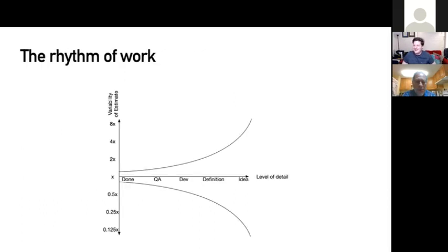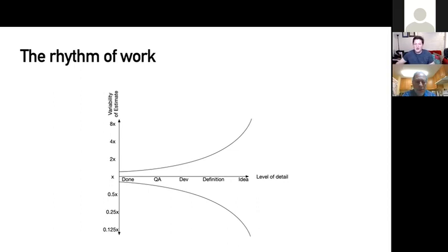When working in a team, you need a rhythm. One common way is the daily standup — at the start of every day, people say what they achieved yesterday, what they're planning to do today, and whether anything is blocking them. It's a good way for people to stay in touch with colleagues and what they're working on — you might say, 'I'm working in a similar area, maybe we should chat to make sure we're not duplicating work or approaching things differently.'